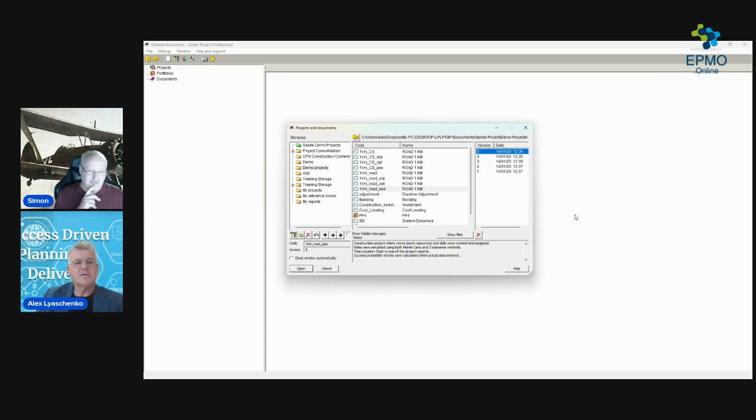I tend to turn that off for the reason that people do what-ifs and then find themselves saving over what they didn't want to save over. So it's just backup files. They're not hurting you. I'm talking about Project. So in MS Project, someone opens up their project, the project manager is working away on a what-if scenario, trying to plan around a problem or something, and the auto-save saves their imaginary forecast. Save, not publish, so it's not out to the world, but they find themselves undone. So I've always turned that off as part of the config and said you're going to do a manual save or a manual publish. I don't mind either way. But I normally just create it as a new version.